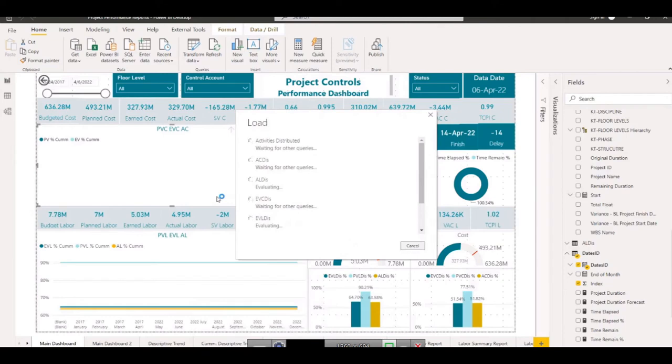So this is the thing how you need to basically check and verify the data. You need to go to the sources of each query and check number of columns are okay from the Excel, and you need to see if the errors are coming in the timeline. So the trick is that always go above and below the unpivot step, so you will get a very good idea where the problem lies. So with little bit practice, definitely you are going to resolve all this issue. And there are some other errors also come, so I will be looking into those errors as well.